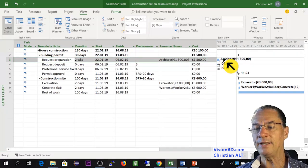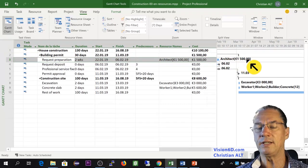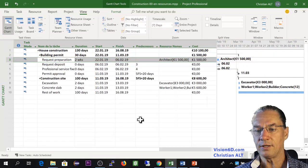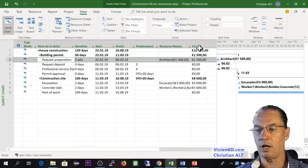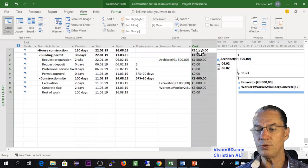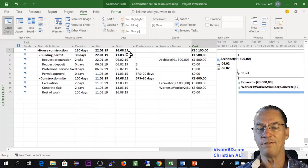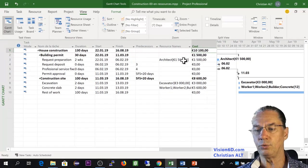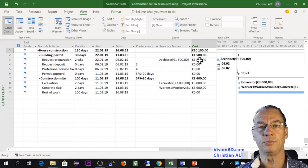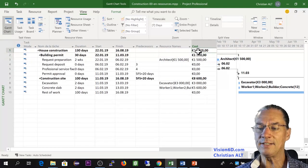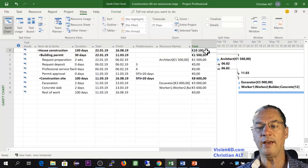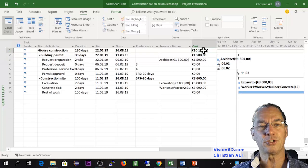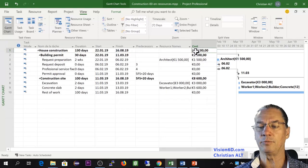And on the Gantt diagram part, you see it as well. With this going up here in the column cost, you see that on top here, now we have 1,500 for the building permit, with the detail of the cost that comes from the resource architect. And here up, interestingly, you see that we have an evolved cost of the total of the project at that time for 10,100.